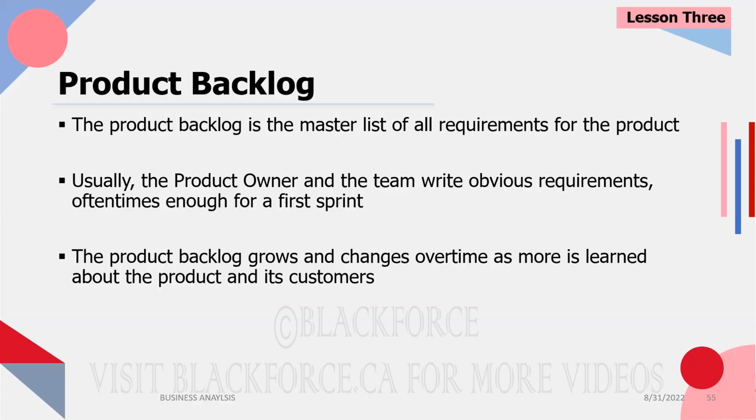Can you please validate these 2 requirements and tell me which one of them is valid? Okay. Now, when they tell you what is valid, obviously you're going to go back to your team. You're going to update the requirement. Hopefully, it's not something you developed 6 months ago, in which case you're going to need a change request. Okay.